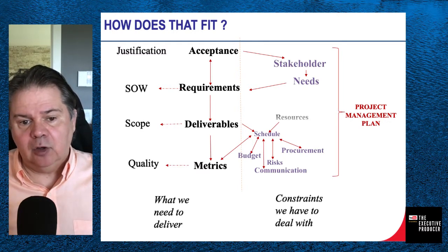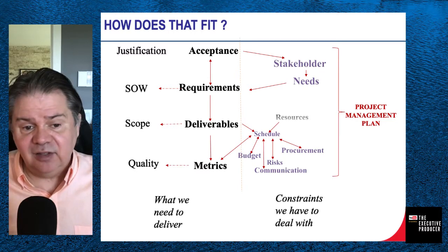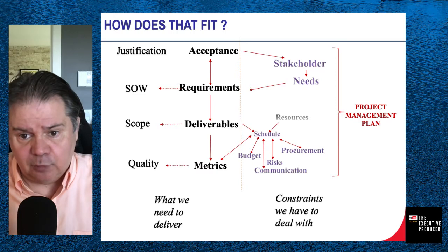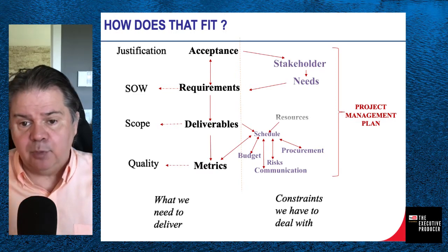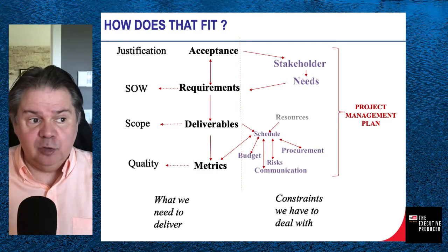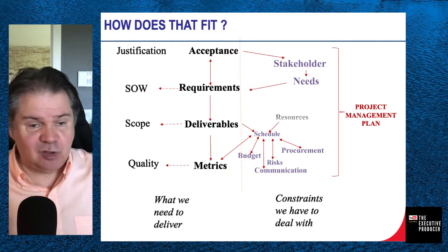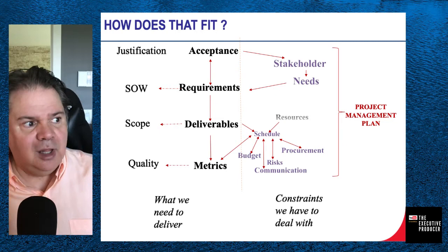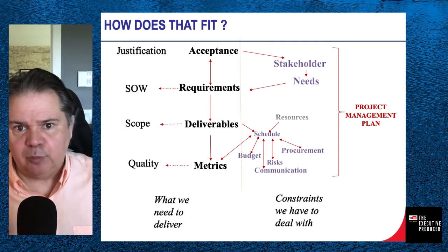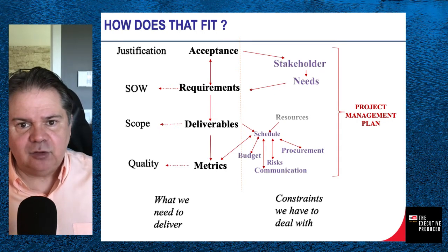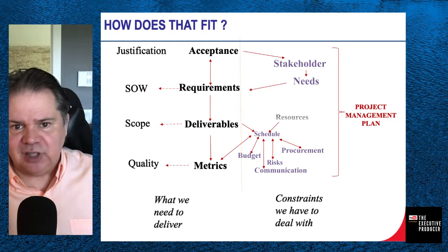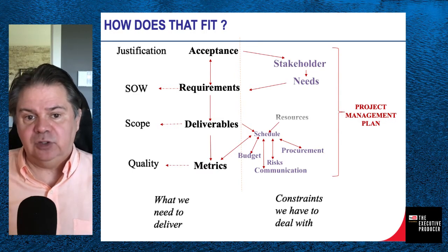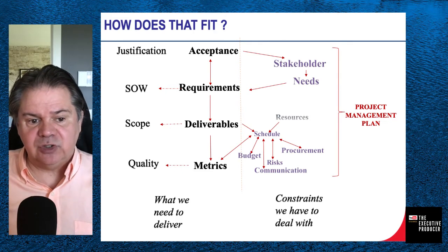And finally, you're going to bring procurement, all the activities to procure these resources that we don't have. Okay, that's what we do in procurement. We go get the resource we don't have in the pool. So, could be a very simple activity such as going on Amazon and placing an order, but it could be very complex too, such as writing a full request for proposal, sending that to potential vendors, selecting vendors, negotiating contract, etc. So that could be a lot of activity too. So all of this needs to go in your schedule.